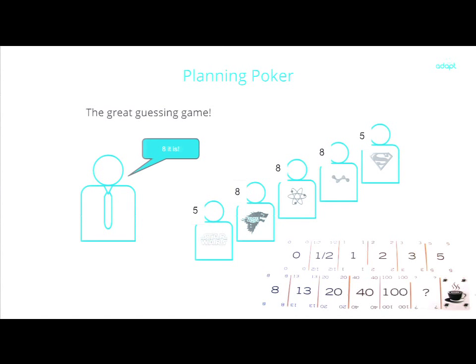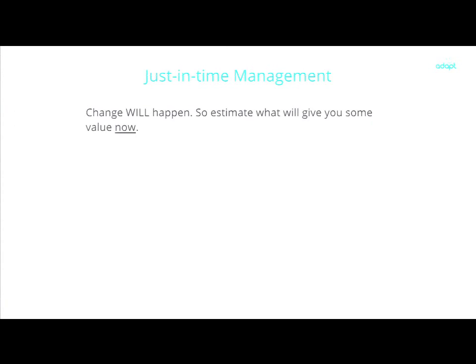And the guy who spent the 3 hours can then tell the rest of the team, this is what I think. And this is also a great thing. Of course, it's great for estimates, but another good thing about the planning poker session is that you also get a forum to share knowledge between your developers. So don't think that you can do this with just one or two guys. Do it with the team.